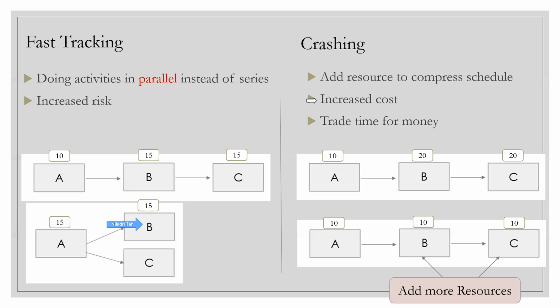And your senior lead may tell you, what if I give you two more guys there or one more guy there? Can you finish that work in 4 days? So if you're telling that with one person, you can finish your work in 5 days, which is basically 40 hours, with two persons, can you finish that same work in 2.5 days? That kind of a conclusion comes in, but this will always lead to increased cost.